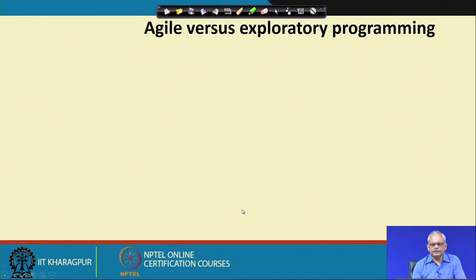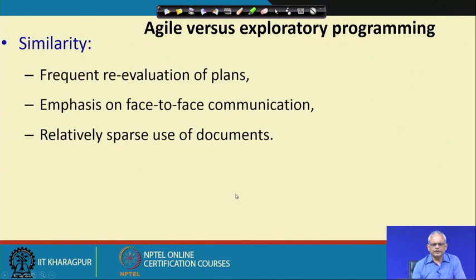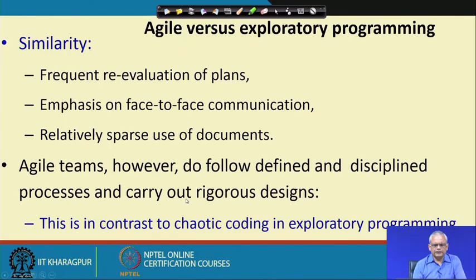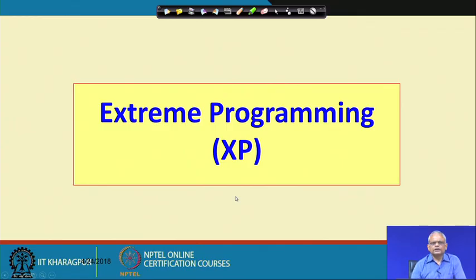Compared to exploratory programming, Agile has many similarities — face-to-face communication, discouraging documents, frequent re-evaluation of plans. But in contrast to the exploratory model, Agile has a system: every increment is developed according to a plan with design and coding following a waterfall model at the increment level, contrasting with the chaotic coding of exploratory programming. We stop here, and in the next lecture we look at one of the Agile development techniques — Extreme Programming. Thank you.